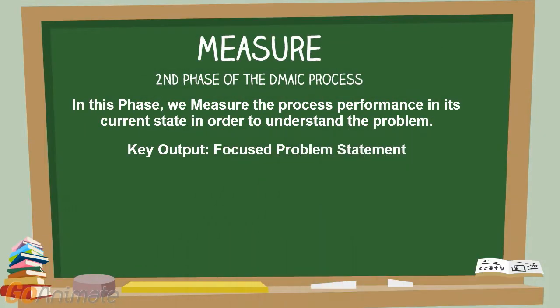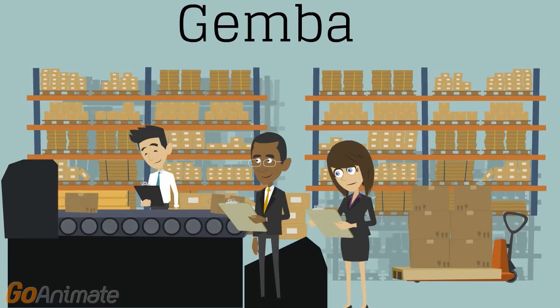In this phase, we measure the process performance in its current state in order to understand the problem. The key output is a focused problem statement. Through data stratification, we are able to determine which areas of the process need to be analyzed in the next phase. The Measure phase is 2–4 weeks in duration.